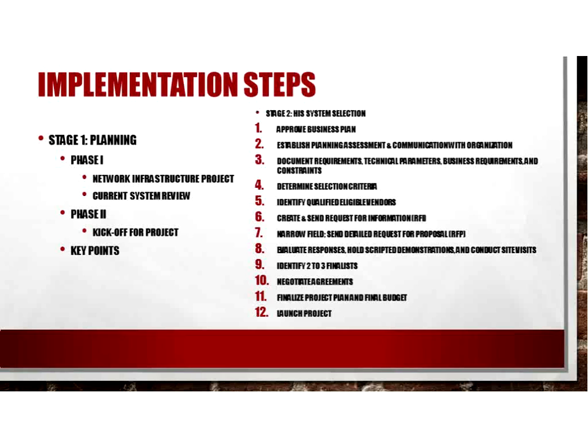Another thing that's also important is that you need to think everything through, write the entire plan down and discuss it, break it down into component parts, and make a budget projection. You need to think this out. It should be thought through from the beginning to the end before you launch into your first project effort. You want to break all your strategic initiatives into recognizable, organizable projects. So you want to put it in chunks and pieces that are a lot more doable than just trying to attack the whole thing.